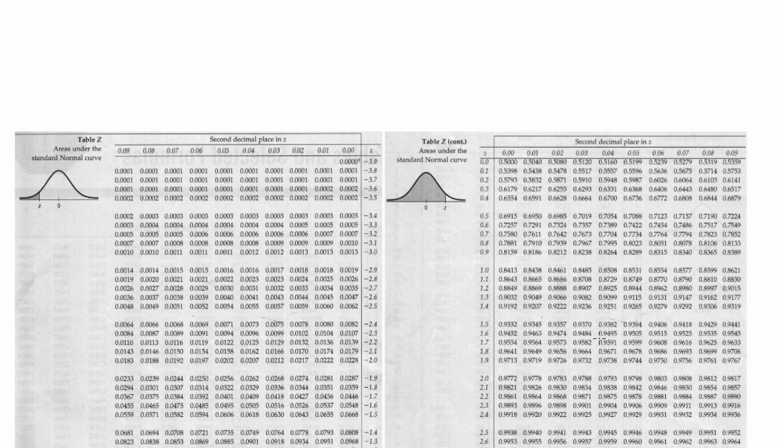We come down here and we just literally look for where it's 0.95. So it's going to be somewhere in here. And actually, look at this: we have 0.9495 and 0.9505. This is 0.0005 higher and this one is 0.005 lower than 0.95. If this is a number line, exactly halfway in between these would be 0.95.